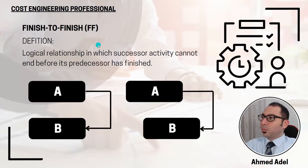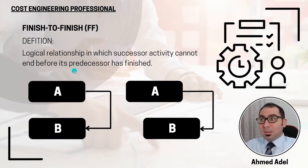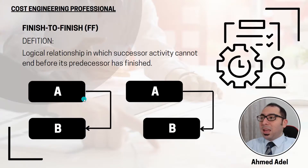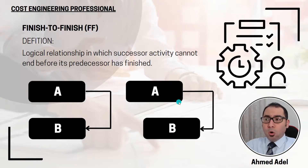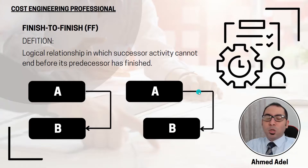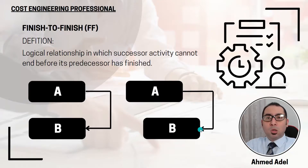The third relationship is finish-to-finish. This is a logical relationship in which an activity cannot end before the predecessor has finished. The completion of B depends on the end of activity A — in order for B to end, activity A must end as well. They can both end at the same time, or A finishes first and then after a specific period of time B also finishes.